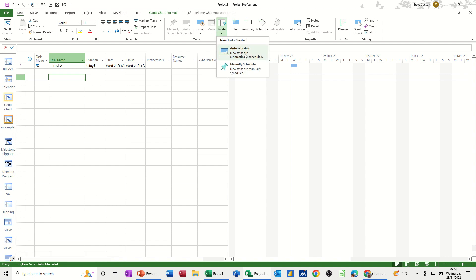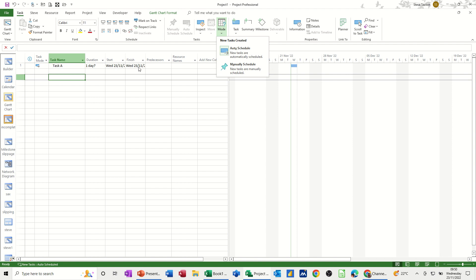Now, I've already got this set up. So every time I create a new project, it's going to be on this. But by default, it's set to manual scheduling. So the difference is this is on auto-scheduled and immediately I did that task. It put the dates in, today's date.